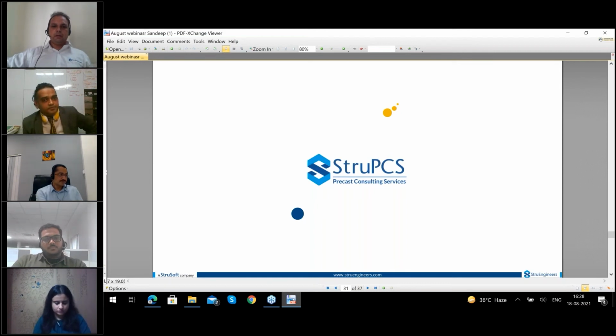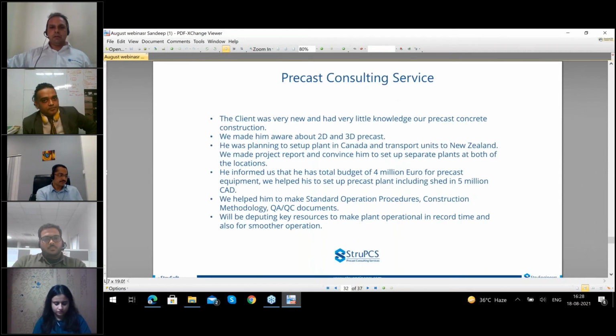I'll not take much of your time. I'll just give the project in brief. This particular client did not have any prior experience of concrete construction. He was coming from a timber construction background, and he wanted to have this mass housing project in New Zealand and in Canada. Initially, he told us that he wanted to set up a precast plant in Canada and transport these modules to New Zealand, which was almost 8,000 kilometers and 90 days of transportation time.